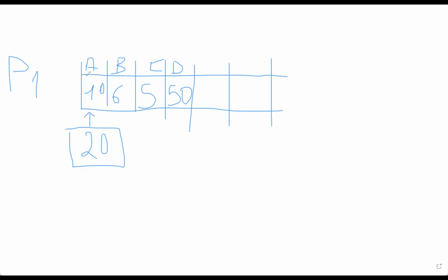So how do I know the baseline? When I create my plan, when I create that work breakdown structure, then I am able to really think about my baseline. I'm able to look at how much money I'm supposed to be using for period 1, period 2, period 3, period 4, whatever periods there are, and I'll be able to take the actions accordingly. So basically, we are looking at that concept in the same manner. We have a plan value. We're going to compare my actual cost, how much I spent, in comparison to the work that I was able to complete, in comparison to how much I was planned to complete at any point in time.